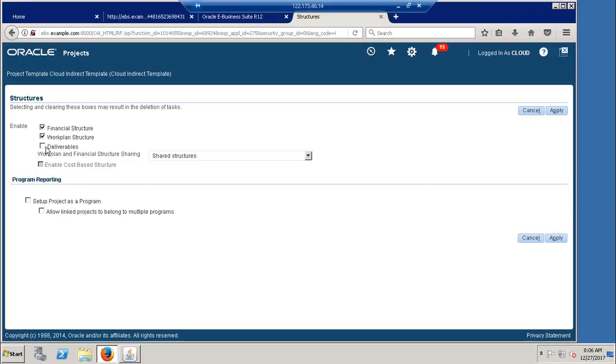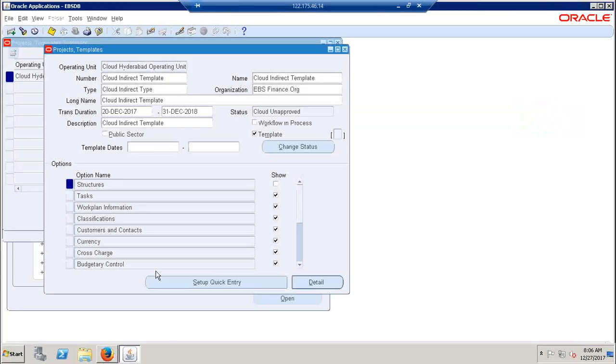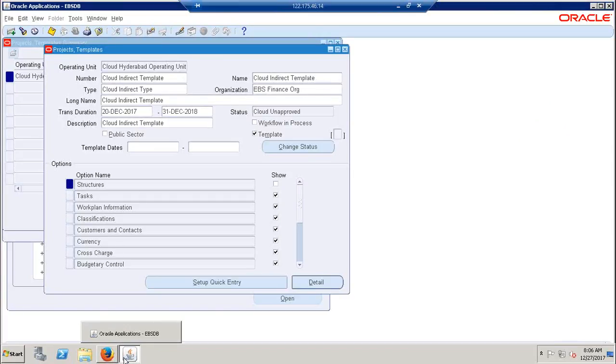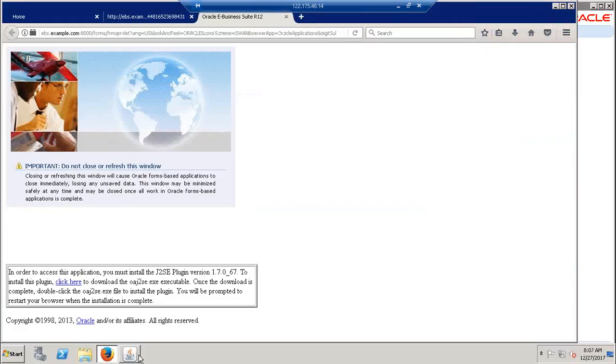I'm just clicking on apply. With this, what happens - the financial structure system will allow us to create the WBS, work breakdown structure, under this project template so that you can have your expenses, create the tasks, and have your expenses set. All transactions are enabled with these structures only. Until and unless you have the financial structure enabled, you cannot perform anything. So I'm just closing this because I saved it.